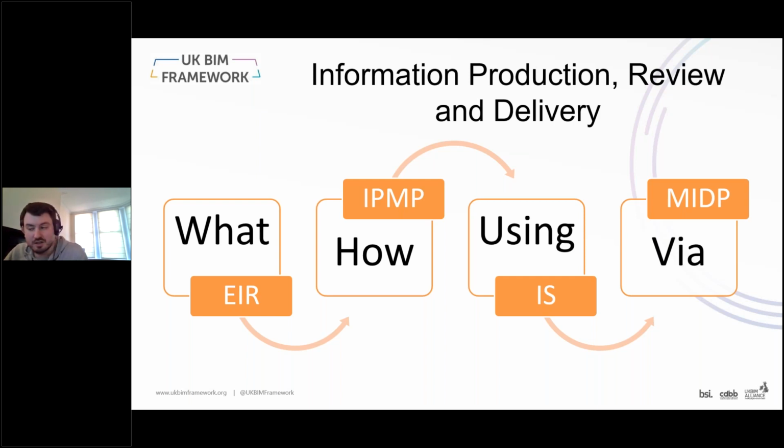The information standard covers effectively the content that gets used during those methods and procedures and as part of that scope. So for example, we've already talked about things like the file naming convention, looking at the national annex of ISO 19650. It talks about having the standard codes placed within the information standard, as well as things like status codes and the revision convention. So while the information production methods and procedures might put the method out for review and approval, it will refer out to the codes and the standardized bits of content that appear in the information standard.